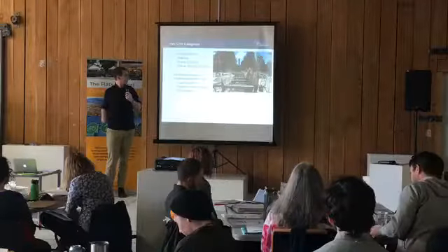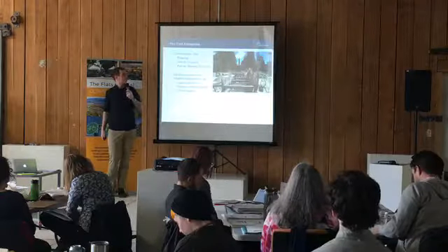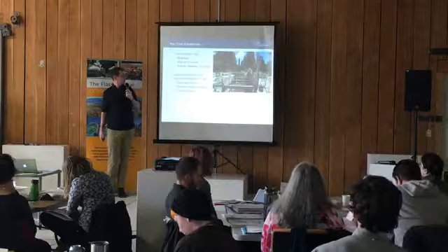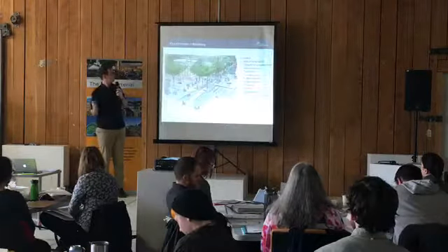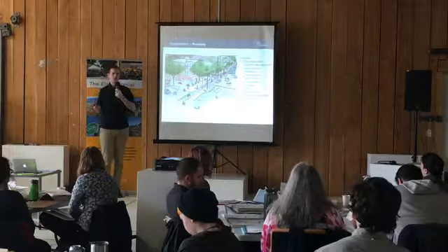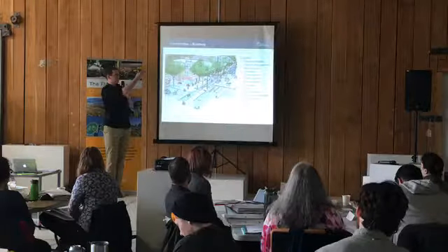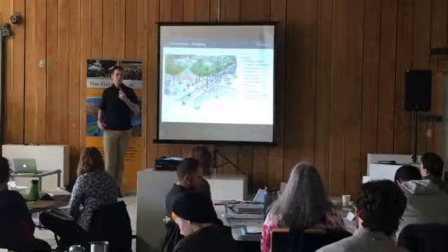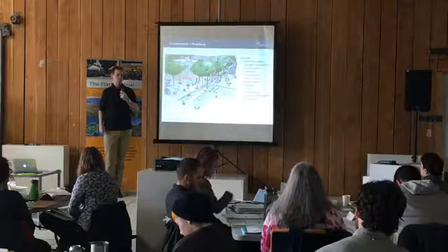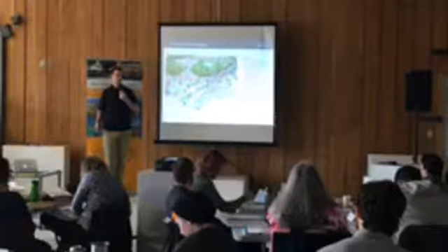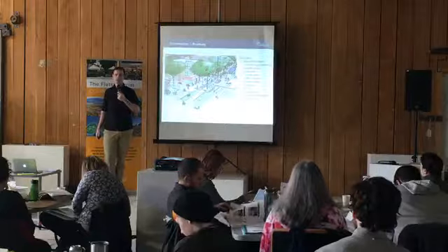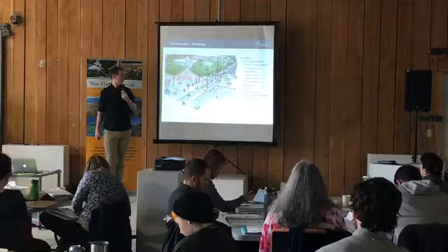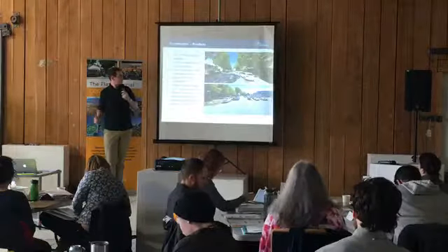In terms of types of costs, we've broken things down primarily into construction costs and land acquisition and property mitigation, each of which has several subcategories, and I will run through each of these. So roadway costs are all our surface roadways. We have all the different types of roadway elements on the left. It also includes subsurface elements such as drainage, utilities, all that sort of stuff that's not necessarily seen, but if it needs to be added or relocated as part of the roadway, then that's all part of these cost estimates.